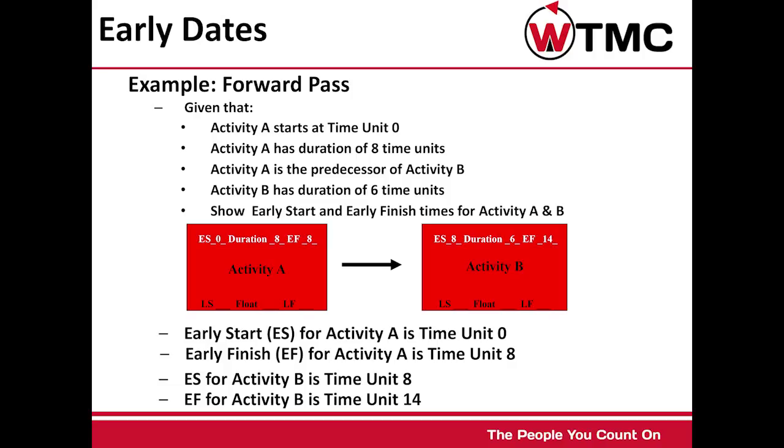The early start for activity A is time unit 0. The early finish for activity A is time unit 8. Early start for activity B is time unit 8. Early finish for activity B is time unit 14.